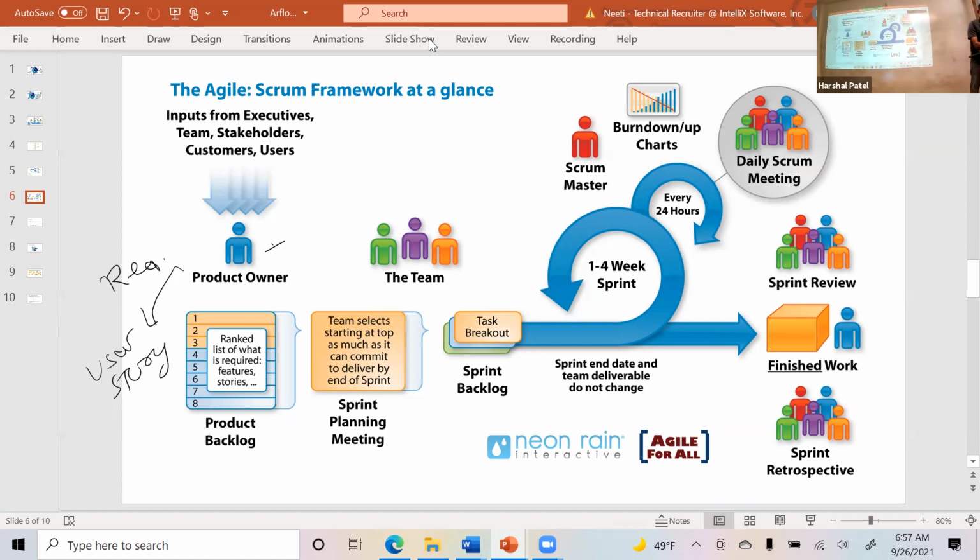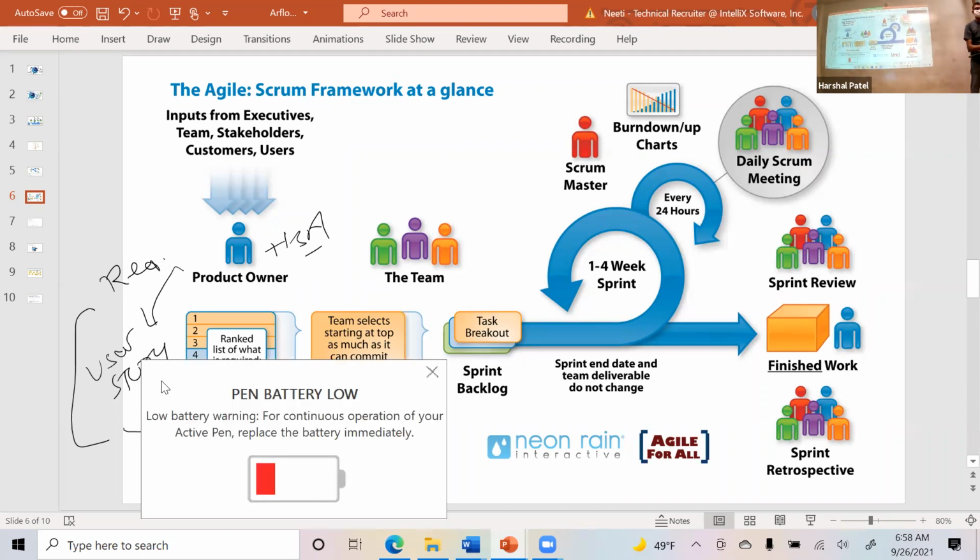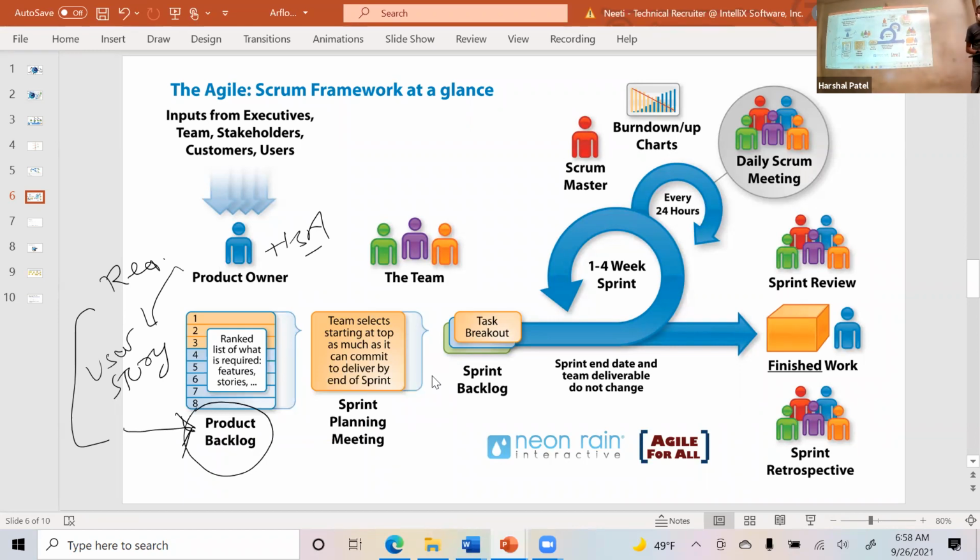So product owner plus BA, you can call it, will collect the requirements from the business and document them in the tool. Now, all the user stories they are documenting in the tool, in the Scrum world, are called the product backlog. Product backlog is nothing but a list of all the requirements that you have, all the stories. That's all. It's kind of like you have a big giant waterfall document; you break it down, each requirement, and put it in the tool, and they become the product backlog. Think of requirement 1.1, 1.2, all those things you document as part of the product backlog in the Agile.